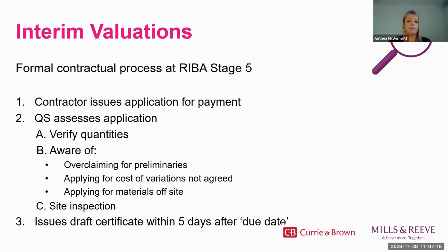They're often monthly and are set up to facilitate payments to the contractor for works complete. The contractor's QS will often estimate the value of works complete by way of an application, and my role as the client QS is to validate that application.